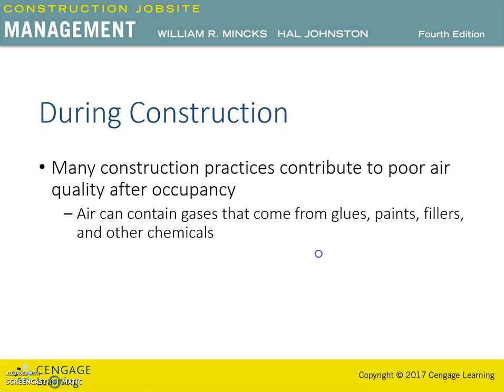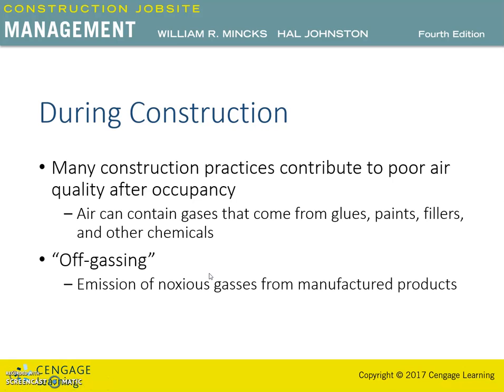For instance, ducts would arrive at the job site with exposed ends, open to all job site contaminants. It was believed that when the air handling equipment was started, the accumulation of dust and other potential contaminants would be expelled out of the duct into the building, eliminating any air polluting problems.